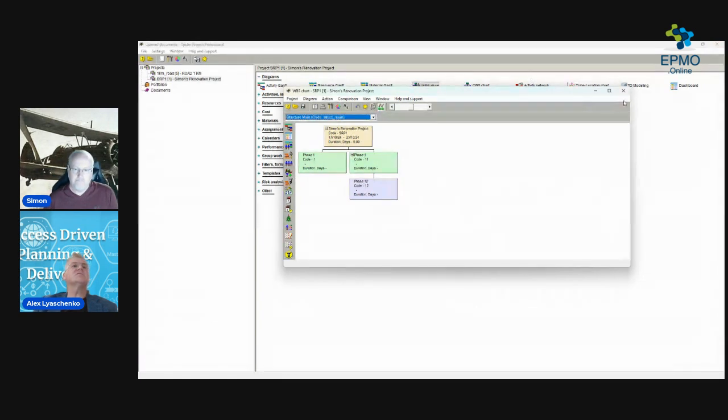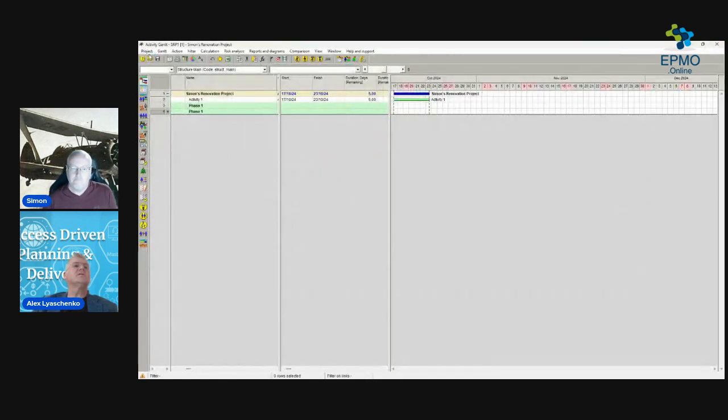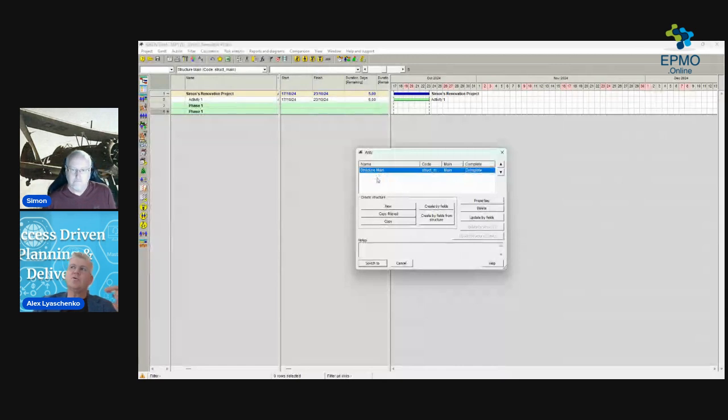So in a schedule, I just touched that a little bit. You can have WBS and you can develop multiple structures. What is important is not grouping. Some other tools do grouping, and grouping is just a view to see data in a certain way. But when you have WBS, you're actually able to do analysis of each WBS in a certain way. So you can analyze what is the cost of one room, or you can analyze the cost of electricity across all your rooms. So there will be different WBSs, one by location, and then you create another by type of works. And you can. That's good, mate. So you can break it down by the work the electricians are doing, as opposed to where they're doing it.